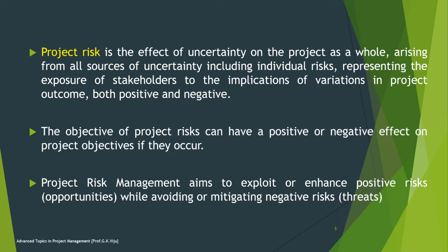both positive and negative. The risk management plan tells you how you are going to handle the risk in your project. It documents how you will assess the risk, who is responsible for doing it, and how often you will do risk planning. Some risks are technical, like a component that might turn out to be difficult to use. Others are external, like changes in the market or even problems with the weather.